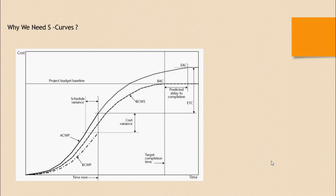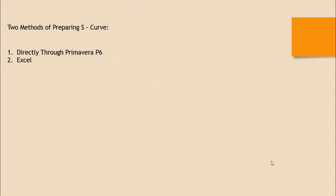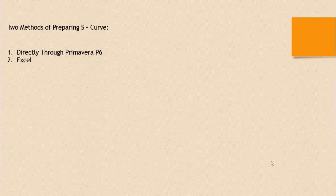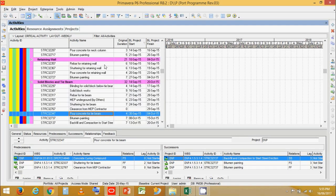Why do we need S-Curves? An S-Curve is an important project management tool which helps us visually track project progress plotted over a time scale — to identify growth or slippage, to know cost variance or performance variance, or any slippage that may occur, enabling the project management team to take quick remedial actions. We have two methods for preparing an S-Curve: directly through Primavera, and through Excel.